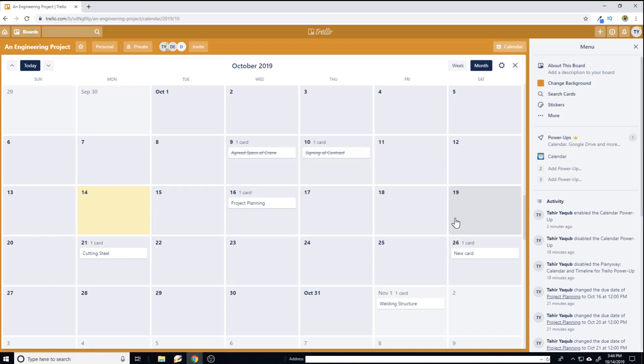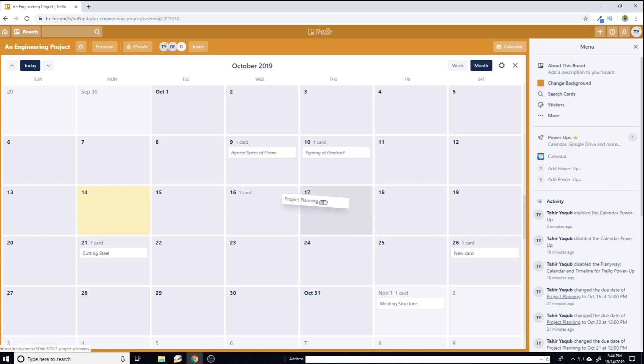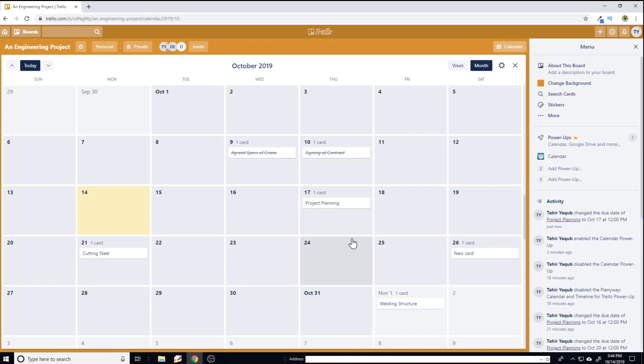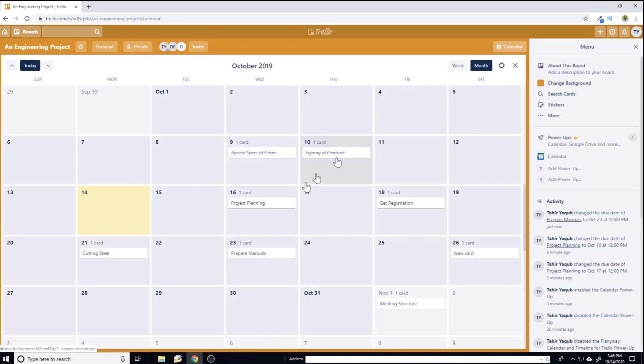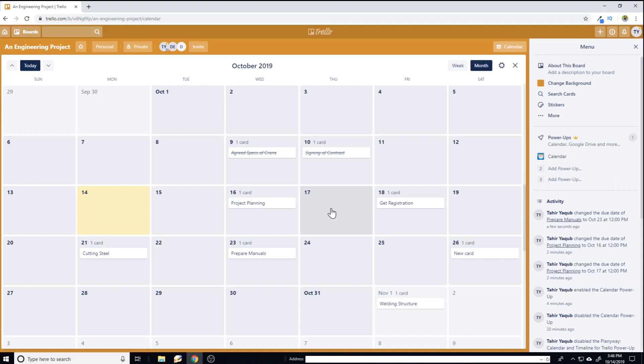And the second advantage, which is from the productivity point of view, is that instead of changing the due date on a card, you can simply drag this card to the next date and it will change. Now the due date on this card will change. So this is the way you can use calendar power up to see the clear picture of your project and to be more productive by having the ability to drag and drop your cards from one date to another date. So these are the two main advantages of using calendar power up.